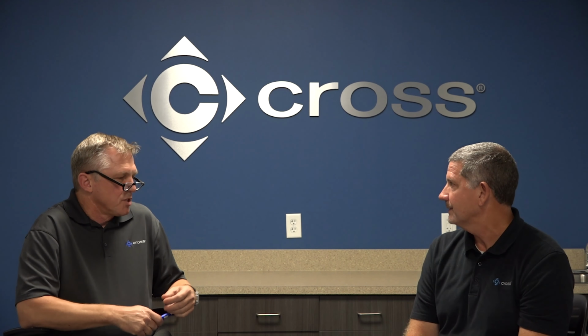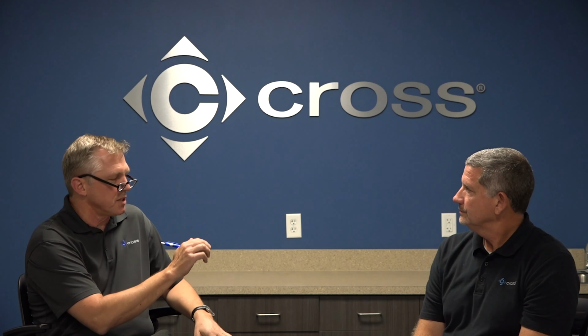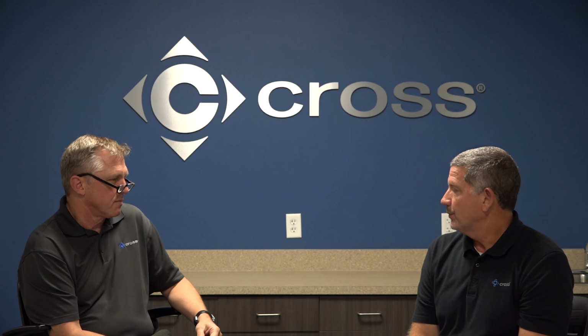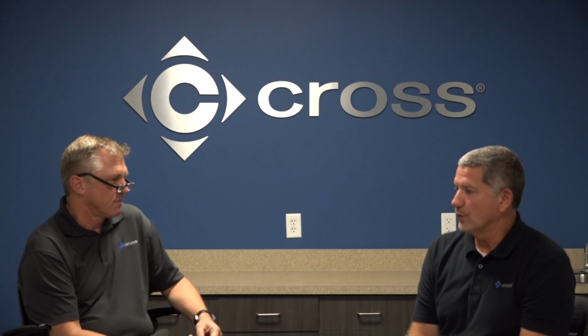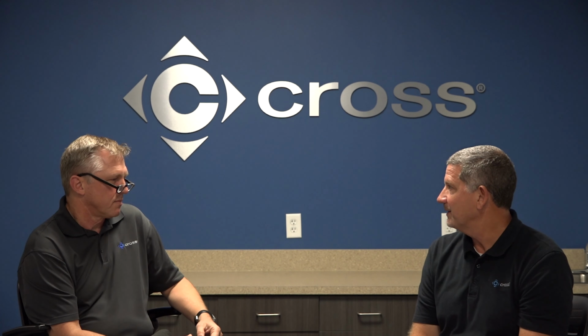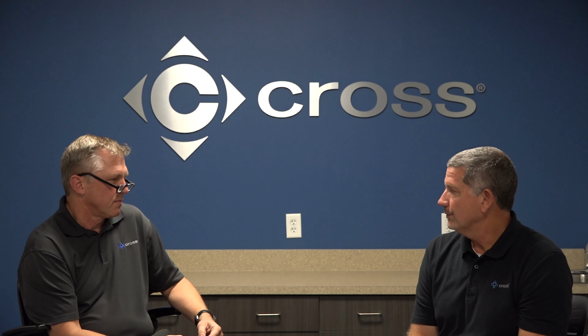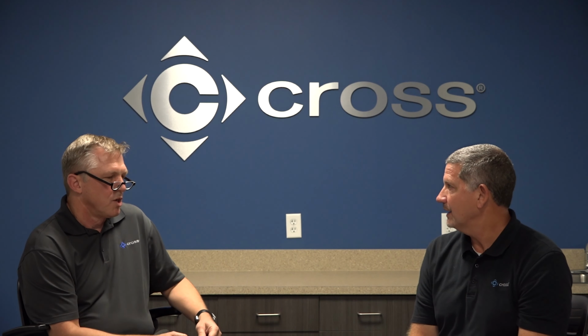So if I have this list, can I call you and say, hey, all these things I need replaced, and these things I need you to service? So what do I do? How do I get that done? Yeah, you can call me. We will sit down and get you a priority, and then we'll see how we want to approach getting these sent into our shop. Of course, we will not do all of them at one time. That could be rather expensive, but we will schedule those for you, and then we will send the quotes back to you. When they come in, we get an immediate go-ahead to get those fixed, and then we'll return them, and we'll keep doing that until we address all the action items on that list.